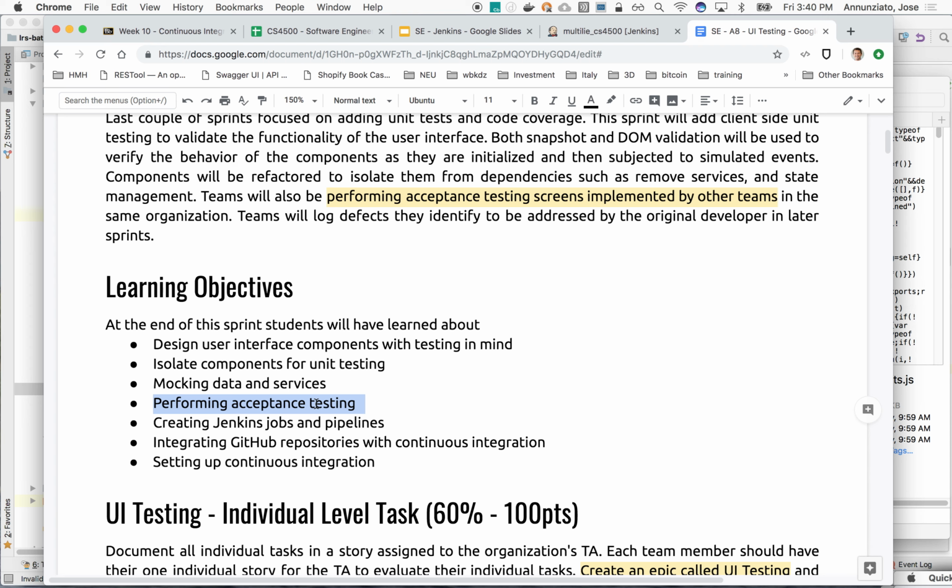It's a missing requirement that was due a couple of sprints ago, and the specifications are clear that it should be there. So don't assume that your buddy tells you, oh no, don't log that because we know that, we didn't get to this sprint. I mean, you're the QA engineer, you're not part of that development team. The specs say that they're supposed to be there and they're not. Log the defect. Okay, it'll be the responsibility of the Scrum Master and project manager to know that, yes, I know we didn't get to this. It's part of this upcoming story, and they'll either close it or say that it's a no-op.